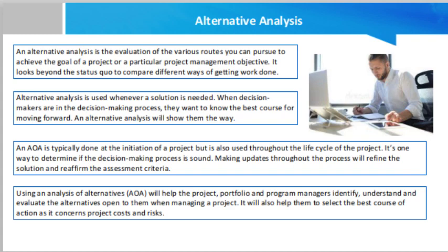Next, organize the analytic framework. Friend, the next step is to define the analysis problem statement, the context of the problem, scope, and a framework for alternative comparisons. This includes the comparison criteria you will use. Frame the analysis with the ground rules you will use, including any assumptions you might have before and during the study. You will want to assess the data needs, collection, and sources used.